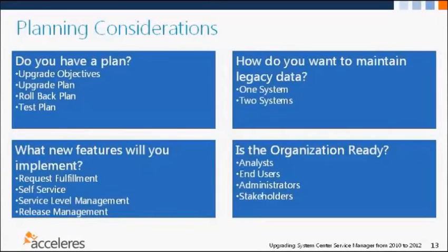So, second consideration then: if and how do you plan on maintaining your legacy data? And you've really got two options. One system, and if your intention is to be able to maintain everything in the single system, then an in-place upgrade is probably the best option. Or if you're okay with leaving things in two systems, which we appreciate that many folks are, and especially since a lot of you have migrated to Service Manager 2010 fairly recently.